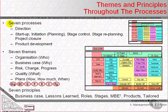The seven processes divide into direction, startup, initiation, stage control, product delivery, stage boundary, and project closure.